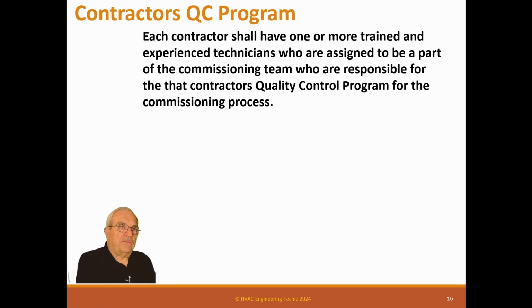Okay, the contractor's quality control program. Each contractor should have one or more trained and experienced technicians who are assigned to be a part of the commissioning team who are responsible for the contractor quality control program for the commissioning process.